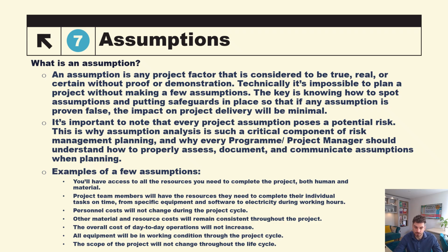A few examples of assumptions are: you'll have access to all the resources you need to complete the project, both human and material. The project team will have the resources they need to complete their individual tasks on time, from specific equipment and software to electricity during working hours.